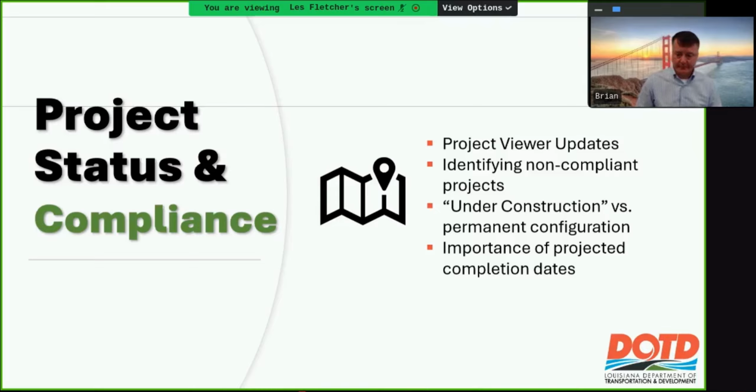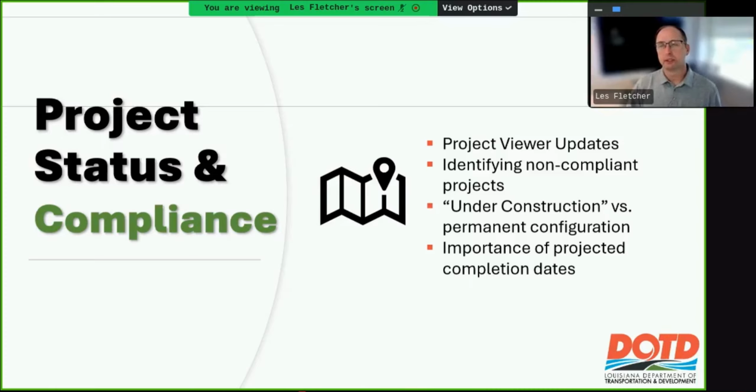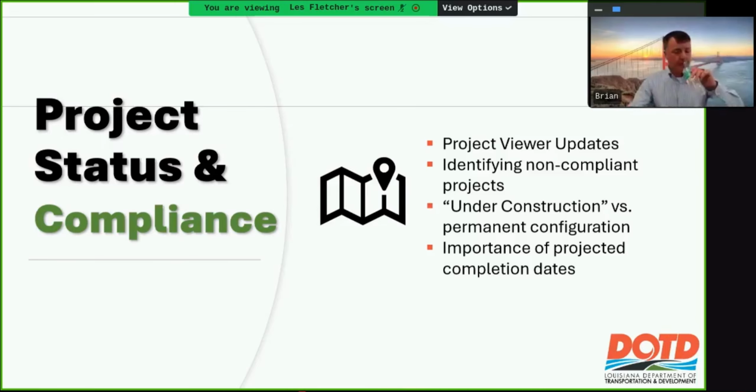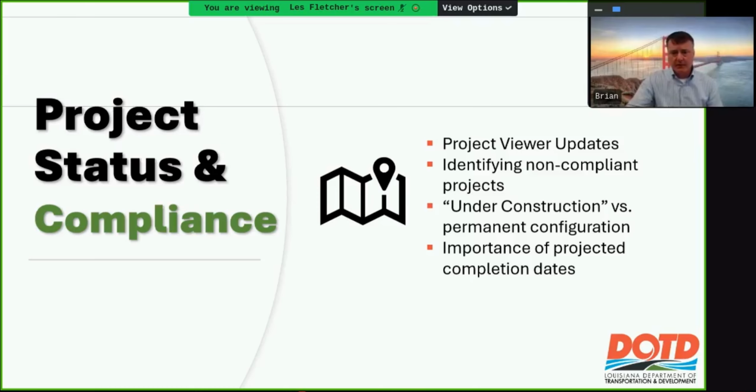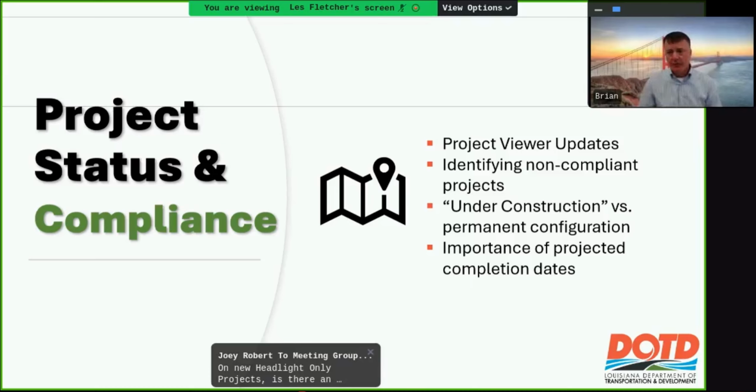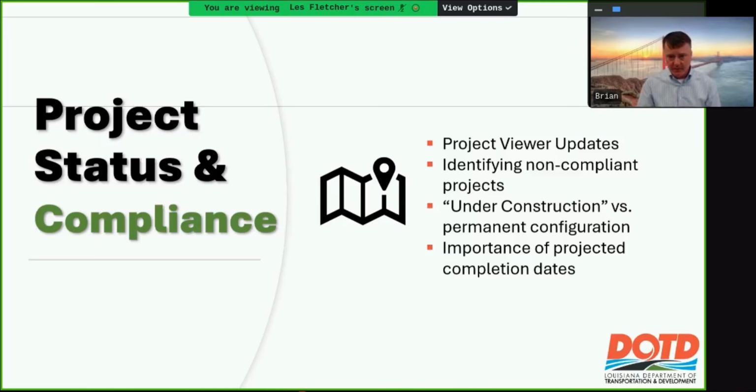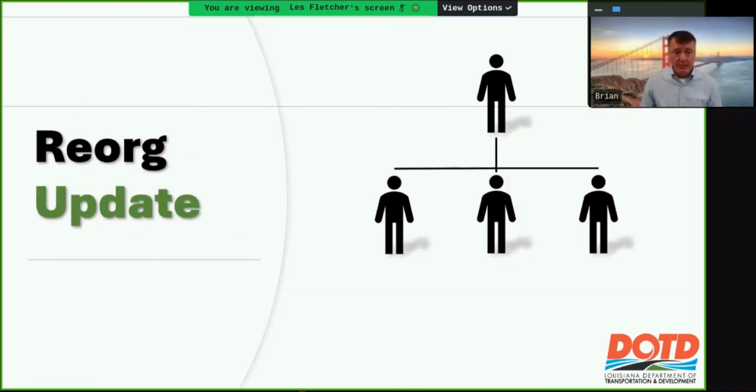Next slide. Hey, Brian, before you move on there, Patrick put something in the chat that I think is pretty important, where some people have new projects and they have not run an estimate yet, so they have not put in a form. I think that we want to update our guidance there. Well, we talked about that last month, Les, that just because you haven't run up an estimate yet, if that project has been let and it's showing up on the project viewer, again, that's your project, guys. Go out there, see if they're out there, and put the completion date in. Just put the contract time plus, add it from today's date forward and get an estimate, put it in there. Otherwise, it shows up blank.